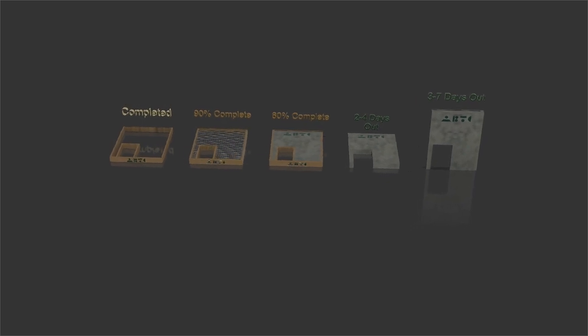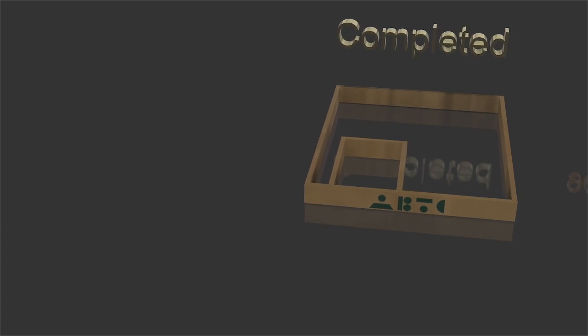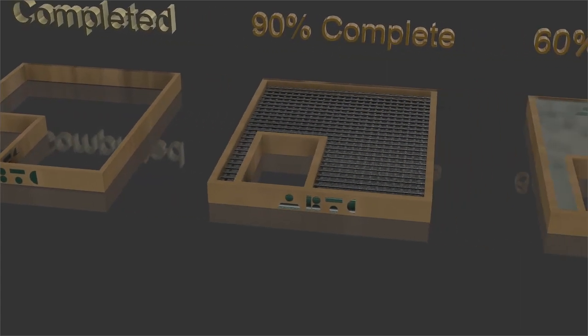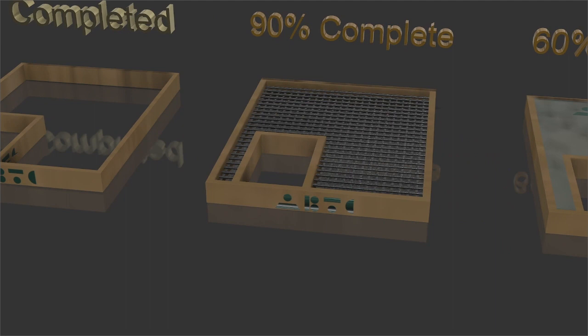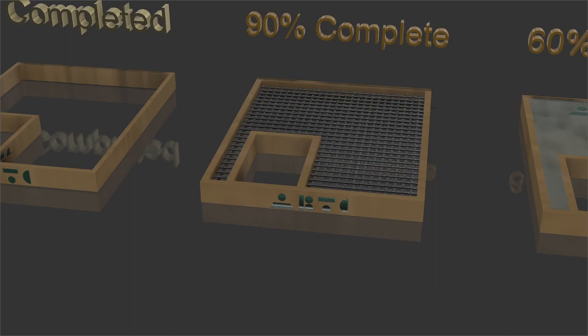Alright, so now looking at what is left before we see walls starting to go up. We have completed the first step of tilt-up wall construction, which is building the formwork that gives you the outlines of the wall structure and any openings within the wall. The next stage of the process was to put rebar within the forms here, and that is about 90% complete. We saw a few of the remaining sections that still needed some rebar work done, but that has either been completed by now or will be completed on Monday.